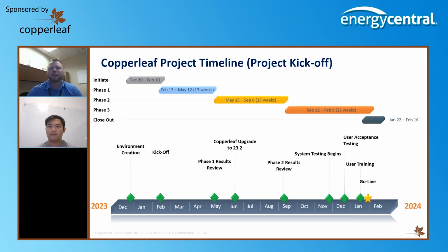And so we felt like we're leveraging this not from a day-to-day, hey, this breaker just operated, therefore it moves up or down in the plan in real time, but rather, hey, here's the plan as we defined it, and then we're going to refresh that plan every year or even twice a year, and then look at the impacts of that. So we wanted to be able to control that.